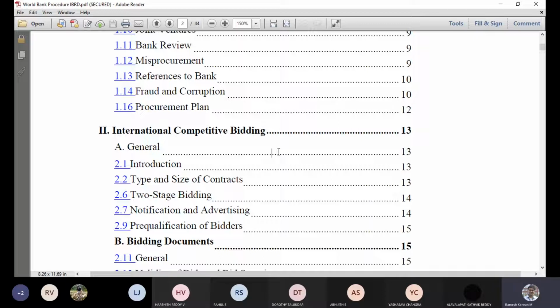An example is the rocket launch, like the manufacturing of the rocket or procurement of the materials for the rocket, and then people looking into the control systems and something like that, right? So those things can be considered a two-stage bidding, or generally there could be multi-stage bidding as well, in which multiple stages of bidding can happen, right? This is only for extremely large projects. Since it's international competitive bidding, multiple-stage bidding can be a good option.